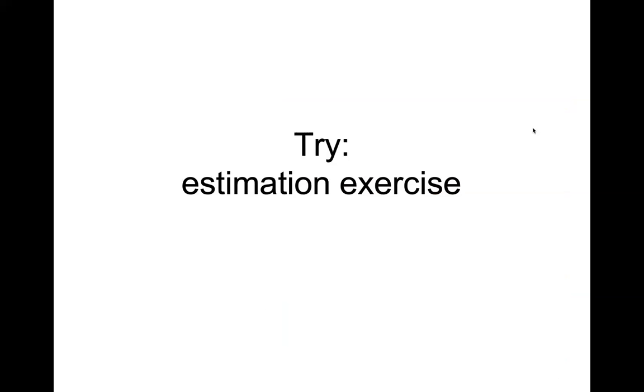Whenever we provide estimations, the team should do an estimation exercise, like the two methods I told you about: the poker game and bucket sizing. The team should always do some exercises when they come to the planning meeting. If they come without doing any exercise, it will be really tough to provide the estimations. If they play the poker game and stick to their own provided points, it's going to be a waste of time for the entire scrum team. So we should try estimation exercises on a regular basis.